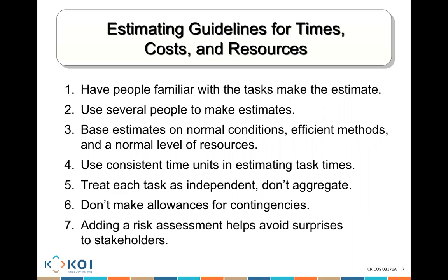When you ask people to make an estimate, tell them to make it based on normal conditions, not based on I'm going to work overtime or I'm going to work very efficiently. Just a normal base estimate. How long is it going to take me to get this outcome delivered?